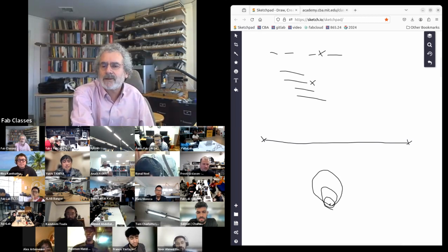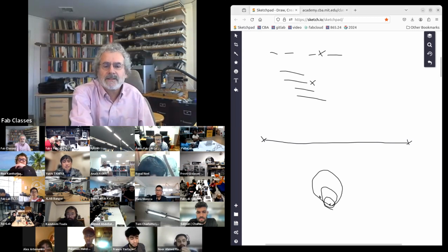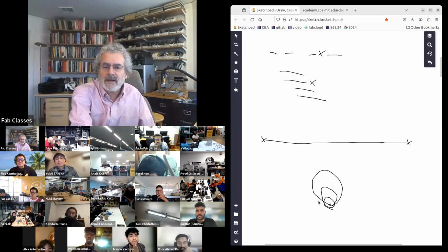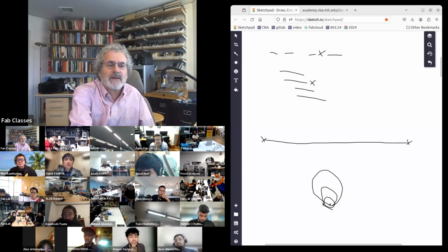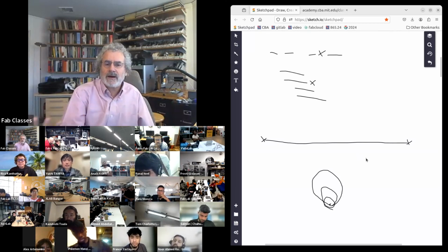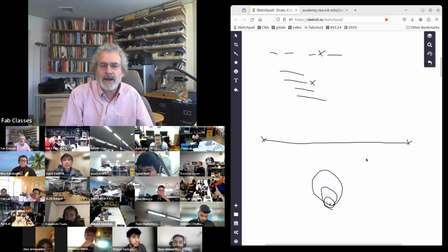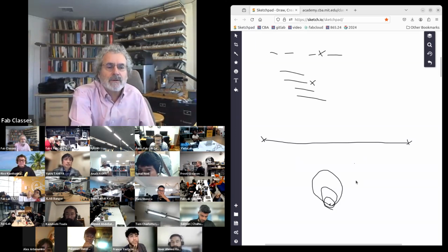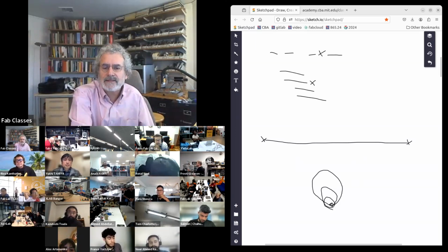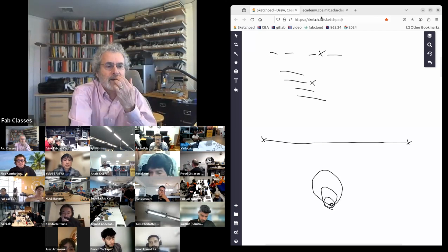Let's say you wanted to make an electric skateboard. The first spiral would just be a sketch. The second spiral could be a cardboard laser cut version, but that doesn't have any electronics. The third spiral goes from cardboard to wood. The fourth spiral goes from wood to composite. The fifth spiral adds a motor, but it has a tether. The sixth spiral gets rid of the tether with a battery. But each spiral, you come back to having a system you can test. And that's going to be a really key principle, to work in spirals rather than in straight lines.